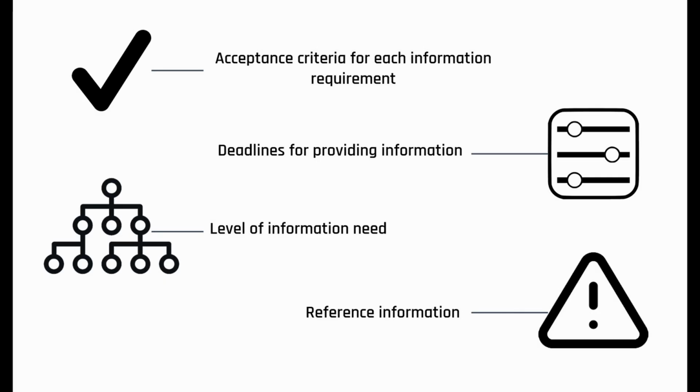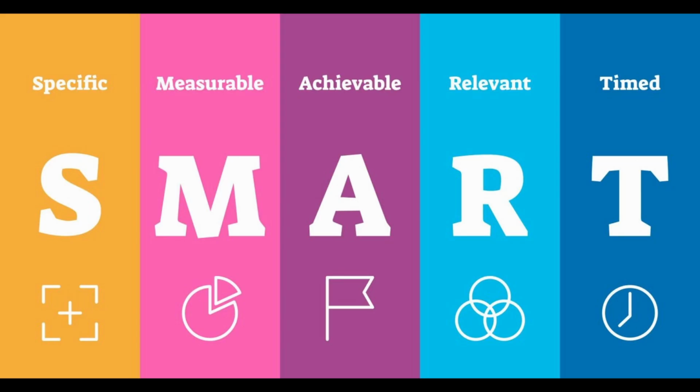5.2. Information Management Process. Invitation to tender. Based on the internal requirements of the organization, the client should prepare the exchange information requirements for a specific project. It is important to ensure that these requirements are limited to predefined objectives that contribute to the organization's business development. This means the client shouldn't demand more than what is necessary for their needs. The requirements should be specific, measurable, assigned to appropriate contractors, realistic to deliver, and time-bound. In short, they should follow the SMART principle.